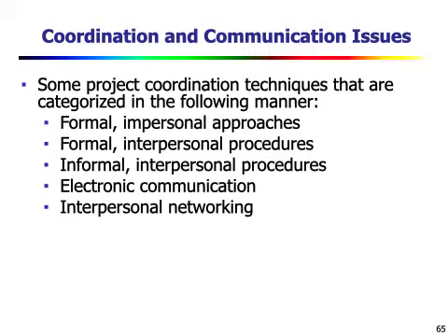So during the scoping activity, no attempt is made on decomposing the problem. Decomposition can be applied mainly in two major areas, that is functional decomposition and process decomposition. Functional decomposition means the functionality that must be delivered is partitioned into smaller functions, and process decomposition means the process of software development will be partitioned into smaller processes. So two types of decompositions can occur.